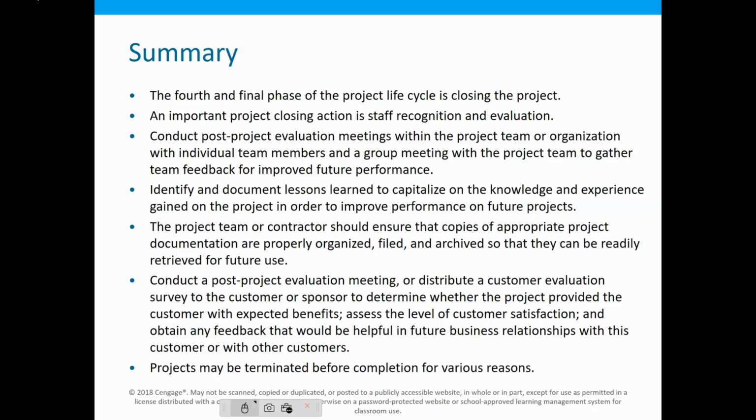And so sometimes these vendors and customers will be really upfront with you, and you can sometimes also see those warning signs. So if you're doing a construction project and they're getting later and later and later paying you for their regular monthly payments, do you need to start being prepared that the project may fail?